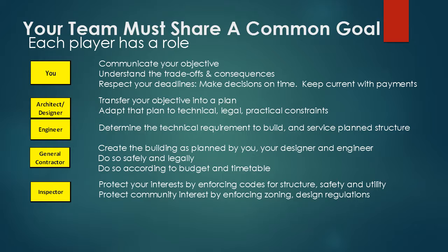If your project involves changing structural walls, electrical, plumbing, or heating systems, insist on permitted work. Without a signed-off permit, you may have trouble insuring your property adequately, and when it comes time to sell, potential buyers may devalue the property for work that hasn't been properly documented or approved. Either way, you assume the risk as the homeowner for shortcuts that don't deliver very much benefit to you.